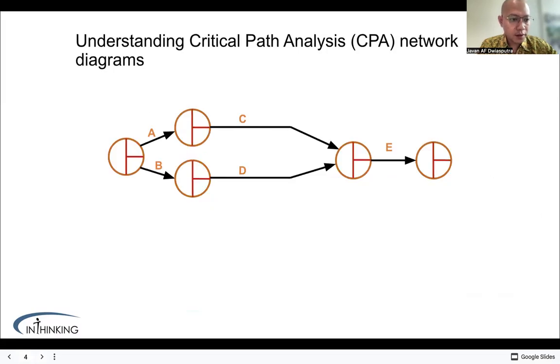Now we can see a complete network diagram with activities, durations, EST, and LFT. The number on the top of the node shows the EST. The number at the bottom of the node shows the LFT. When calculating, we move forward through the diagram to find EST and move backward to find LFT. This process helps managers understand the timing of every activity in the project.